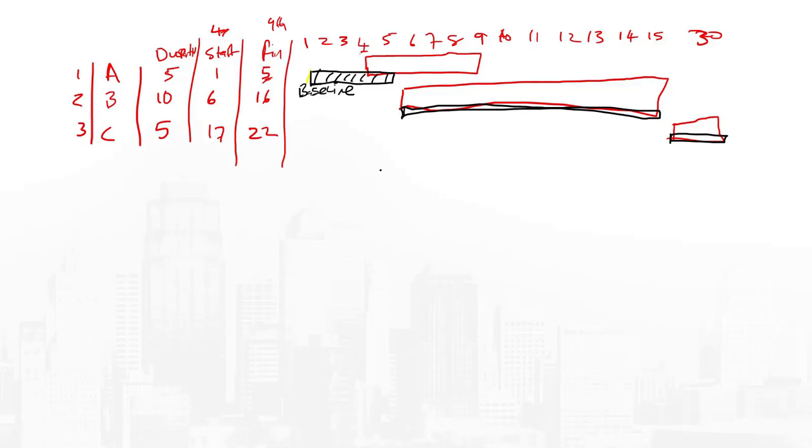So that no matter what happens, if now in the course of the project implementation, this red, that's for activity 2, changes, and then instead of starting on the 6th, for example, it starts on a later date, what you're now going to have is the baseline will still remain. So even if it starts on the 10th, as against the 6th like we initially planned, notice that the baseline will still remain the same. So this can as well shift and say it started on the 10th and then exceeded further and all of that.